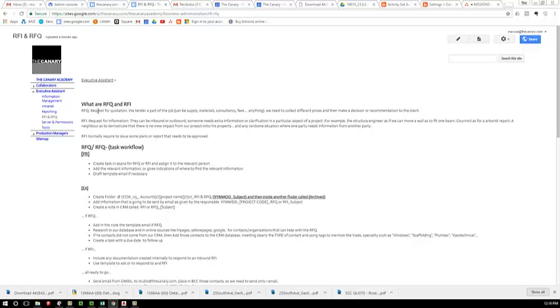RFQ are for when we need to request a quote, a price, a service out there. And normally we need to have an approval from the client. So we need to collect a few quotations, gather the information, expose that to the client, get an approval and liaise. And then request for information is sometimes we need extra information from a hydraulic engineer, or maybe a hydraulic engineer needs information from us. And those things come normally in the form of an email or a phone call, and we need to proceed with the workflow.